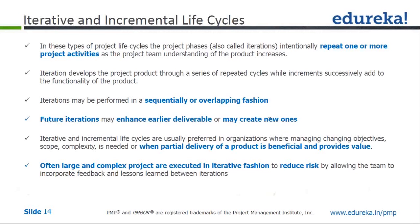Iterative and incremental life cycles are usually preferred in organizations where managing changing objectives, scope, and complexity is needed, and when partial delivery of a product is beneficial and provides value. In predictive or fully plan-driven, partial delivery doesn't provide value — you need the full product. Often large and complex projects are executed in iterative fashion to reduce risk, allowing the team to incorporate feedback and lessons learned between iterations.